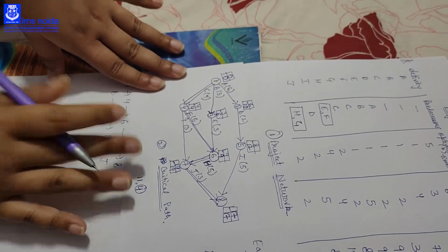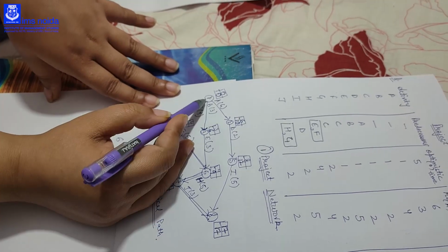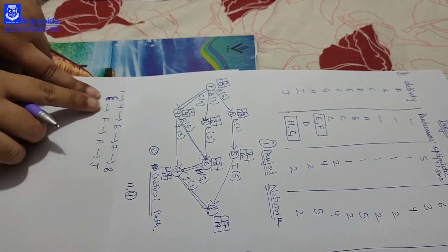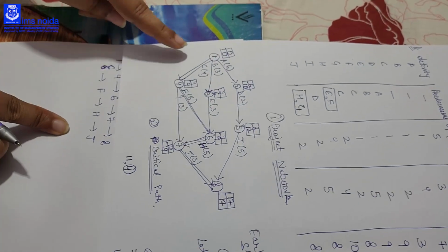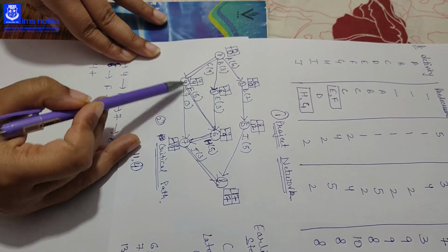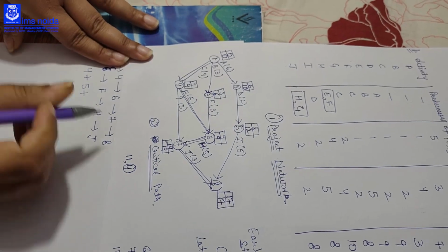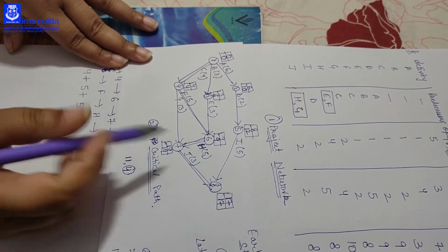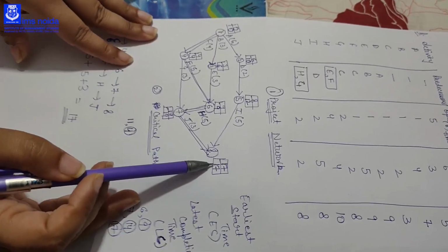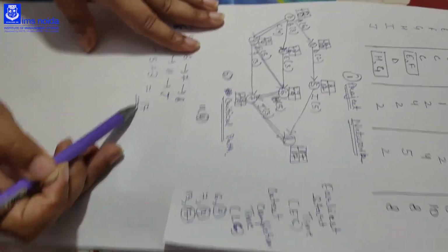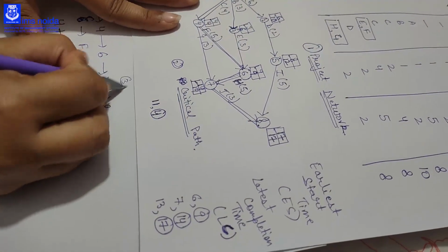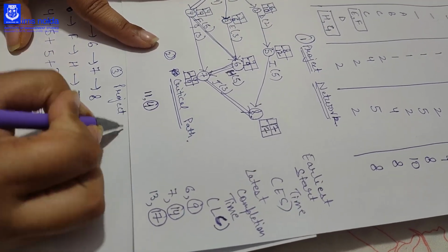Here there is a little mistake, that is if we are coming from 1 to 4, the activity is C, not B, so I have just written it wrong, it is C. Okay, so the duration of 1 to 4 of C is 4, plus duration of 4 to 6 of F is 5, duration of H is 5, duration of J is 3. As you can see, we are getting 17. The end node is 17. We are getting here project completion time 17. So this is basically the project completion time, third part of the question.